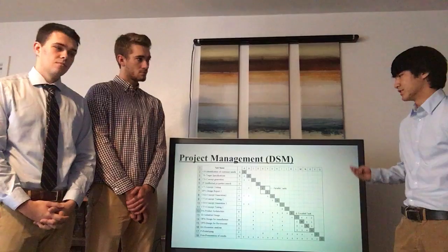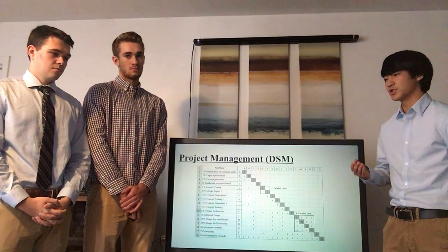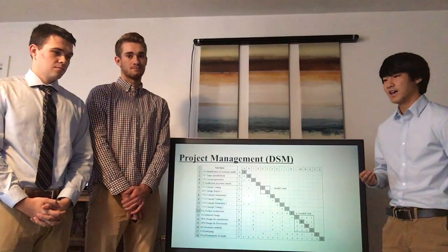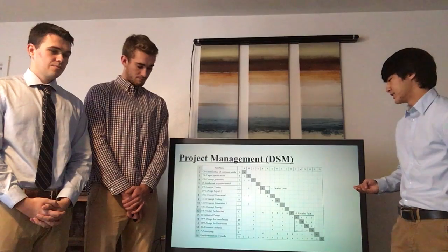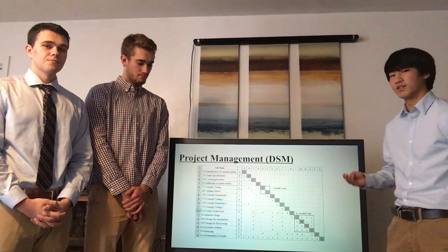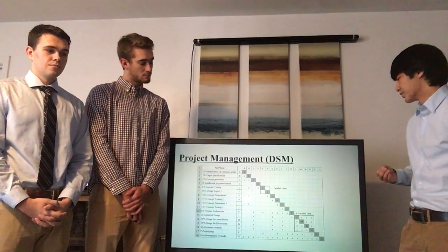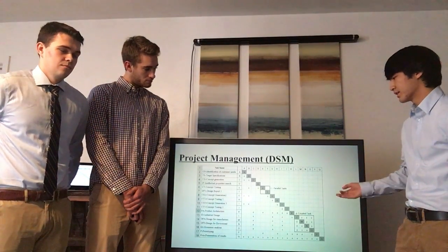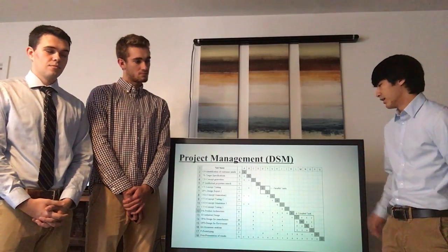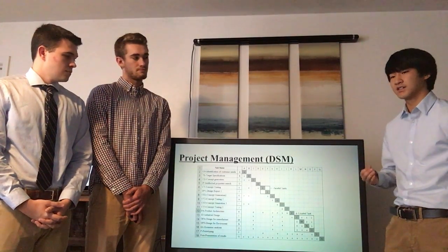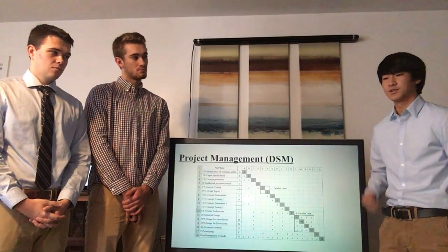This is our project design structure matrix, which takes the information from the Gantt chart and places it to show the relationships between the tasks. As you can see here, the coupled task and the parallel tasks are more clearly labeled, and we can see that the tasks not only depend on their immediate predecessors, but on predecessors before them. As we can see, the product architecture would require information from not only concept testing 3, but also from concept testing 1 and 2, and all 3 concept generations.